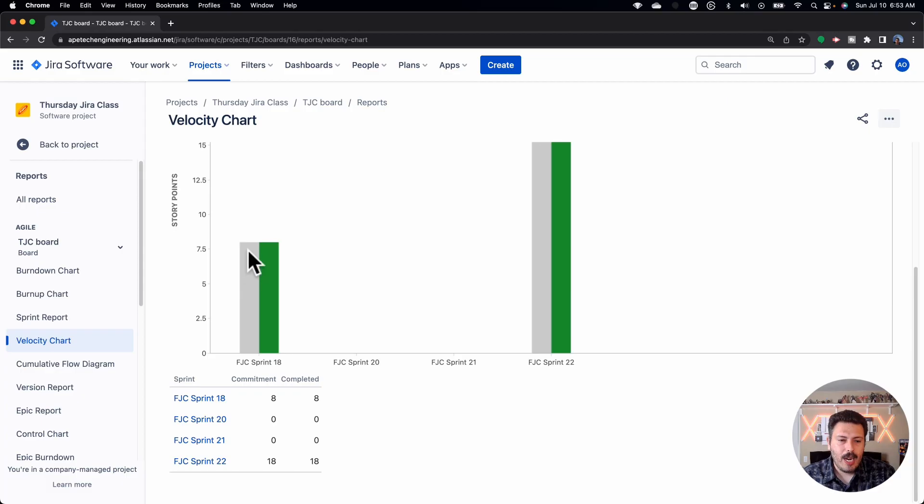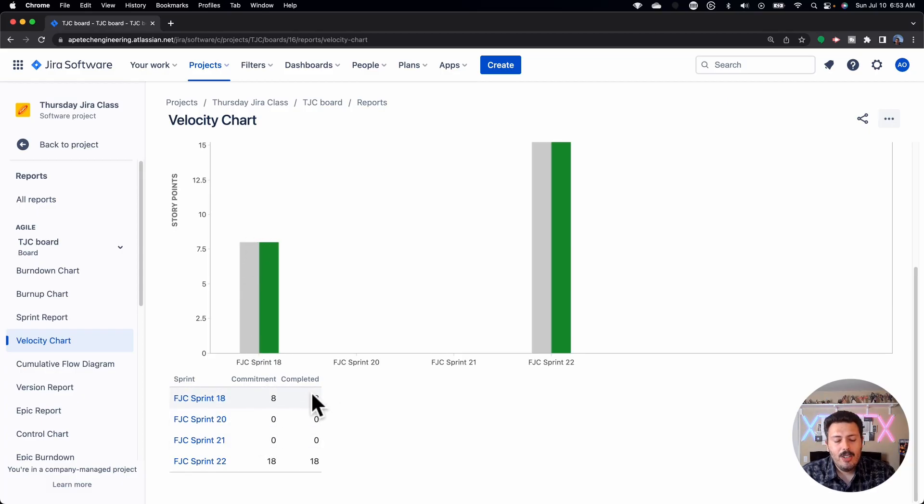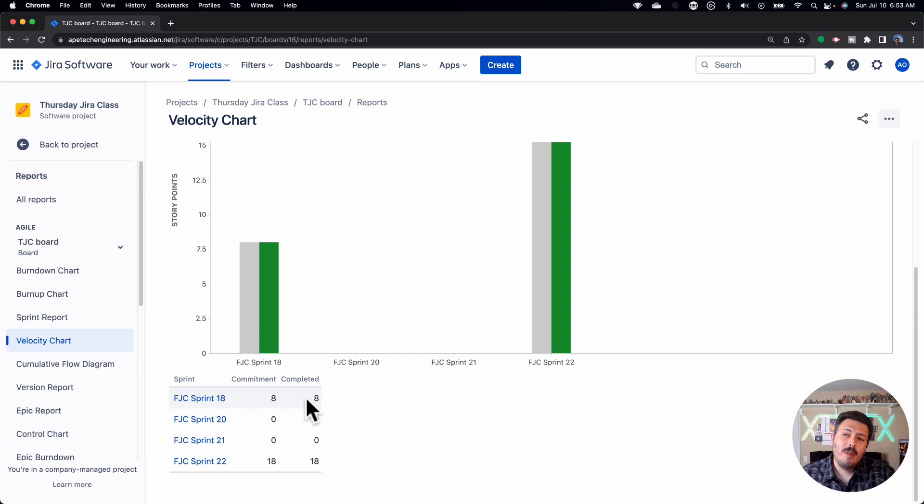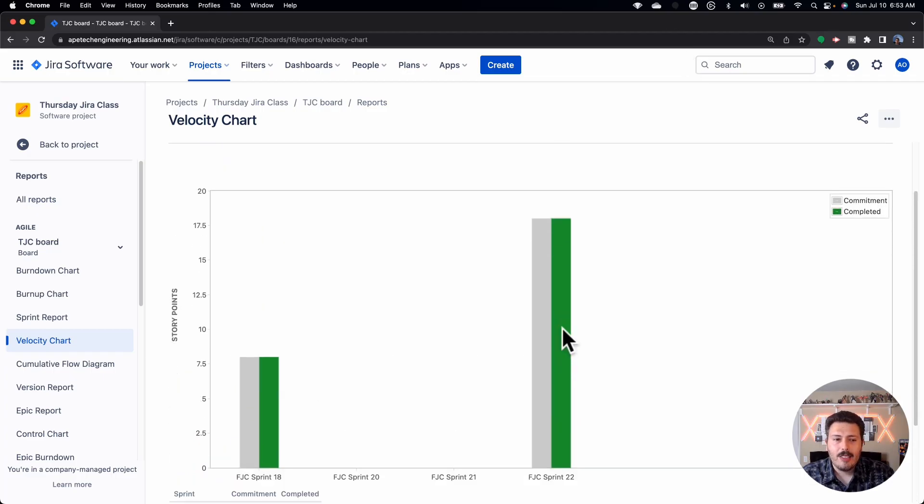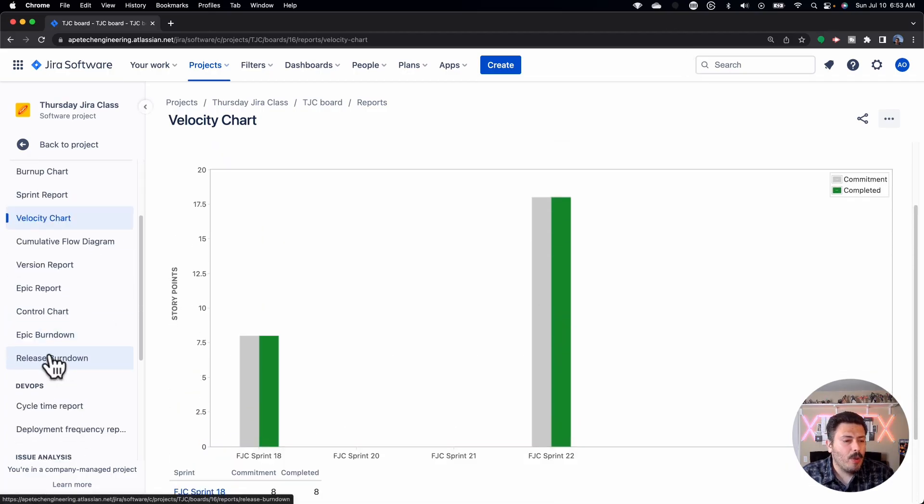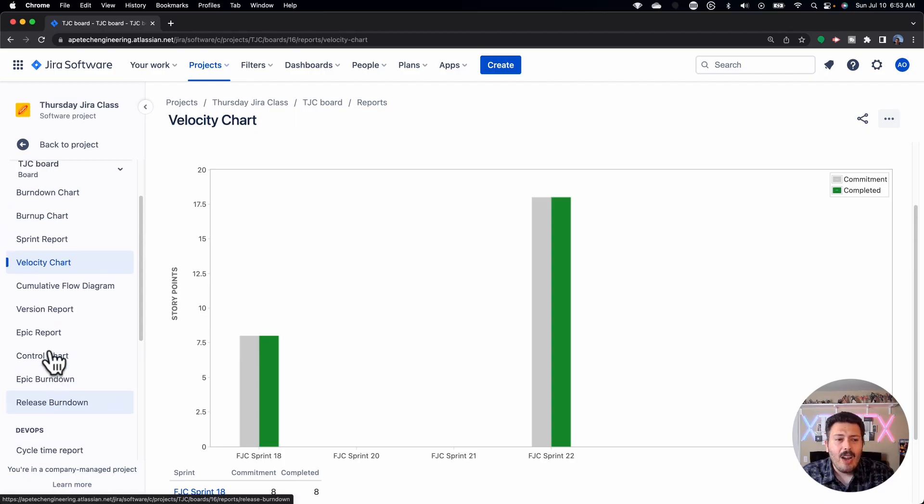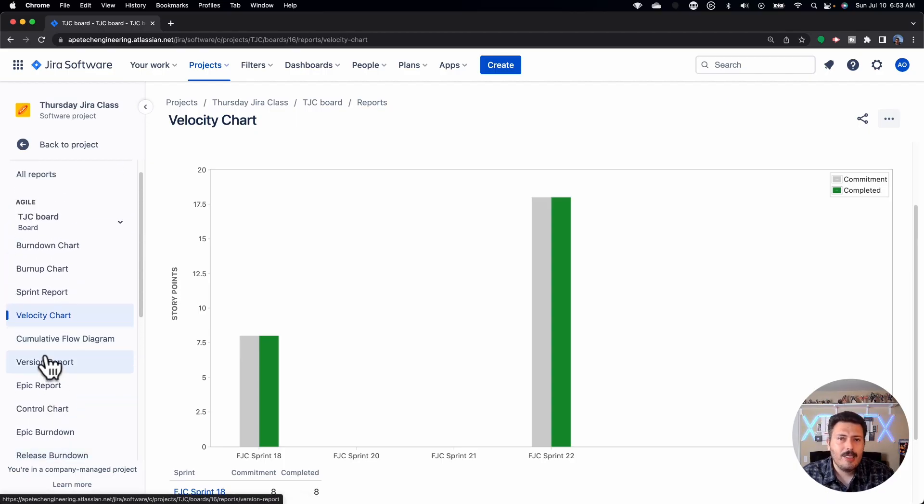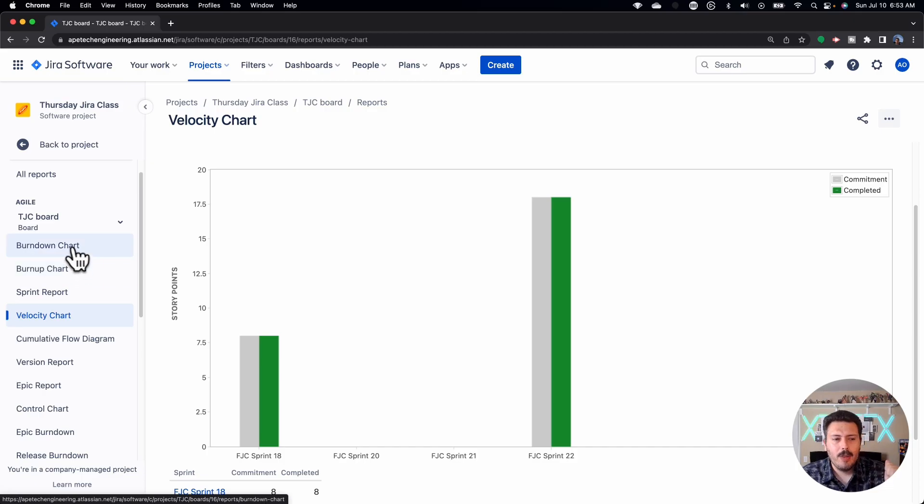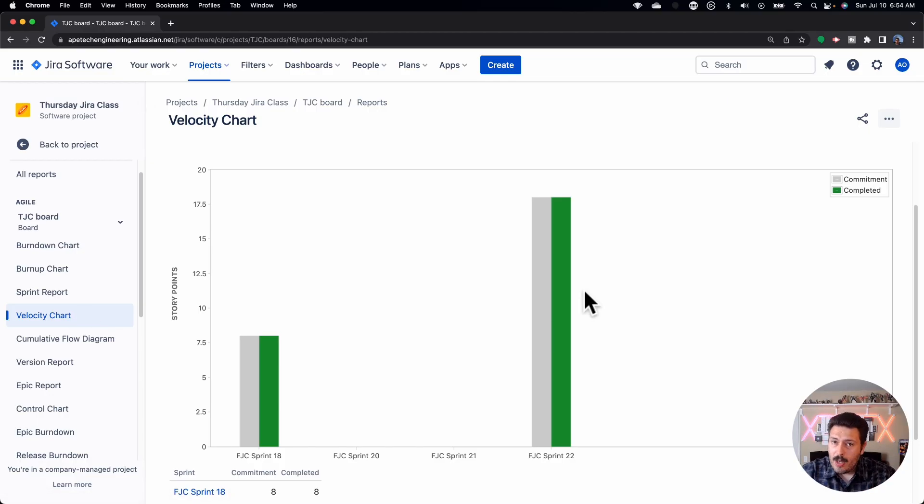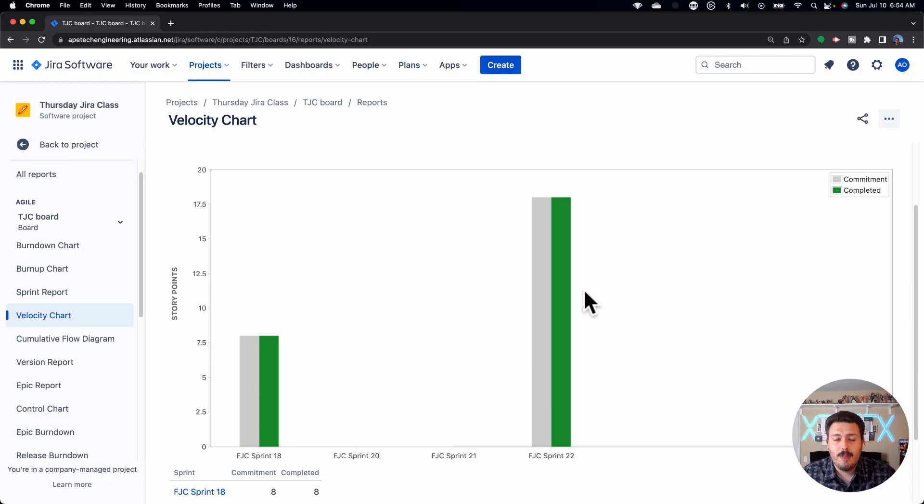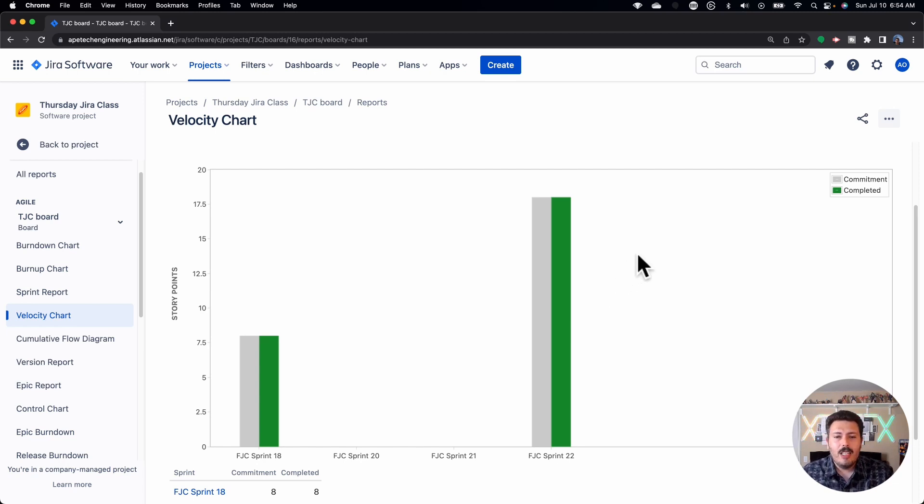Here you want to shoot for like about 80% completion. We're not in a perfect world, and sometimes you're not going to be able to finish it all on time. And so an 80% is what I usually recommend, but these are some of the things that you're looking for as a scrum master. So there's obviously other reports here. We're not going to be talking about them. I don't really use those all too much as a scrum master. And so I wanted to just focus on the burndown chart, the burn up chart, the sprint report, and the velocity chart, which is the four charts you're going to be using. The last thing you're doing here as a scrum master, you're not doing it in Jira. So you're going to be going into confluence. You're going to be collaboration tool of choice, and you're going to be conducting your retrospective. And at that point, you've done all of the ceremonies. You've done all your interactions and responsibilities as a scrum master, and you're ready to basically rinse and repeat and start the next sprint.